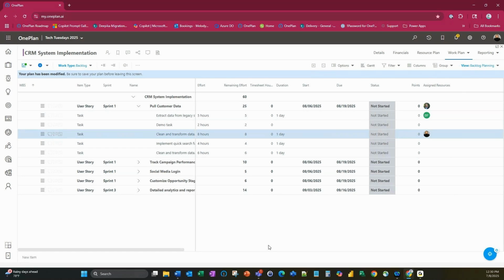They're going to be the person that answers all of those questions and gives you the real-time feedback. So I always think it's important that a product owner, and you may have more than one, be the onus on the story. They may not necessarily do any of the configuration work or any of the tasks associated to the story, but they own it, and they're the ones that validate that it's been completed.